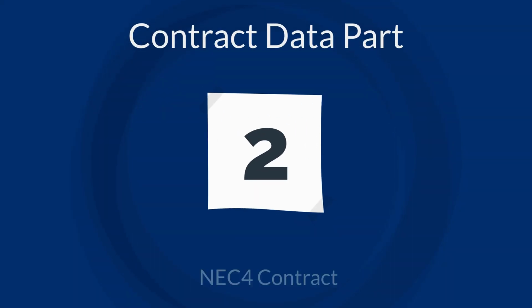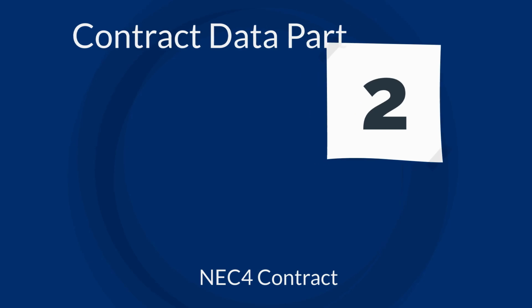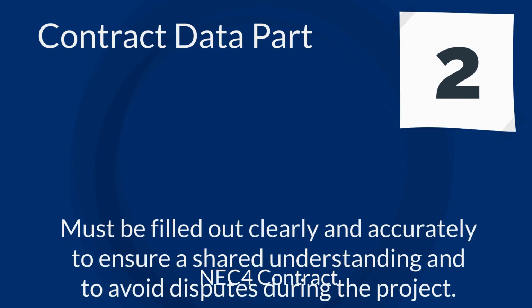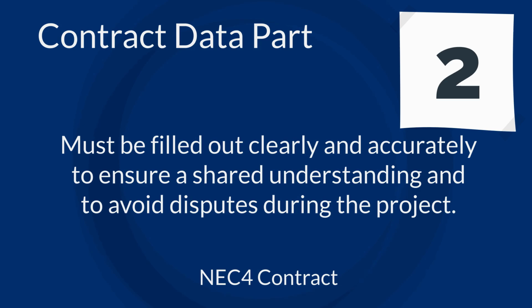In the NEC4 suite of contracts, the contract data is a fundamental component that shapes how the contract will operate in practice. It is split into two parts. Part 1, which is completed by the client, and Part 2, completed by the contractor. Both must be filled out clearly and accurately to ensure a shared understanding and to avoid disputes during the project.